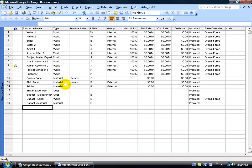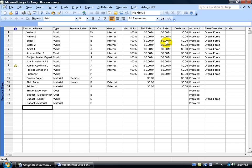Now keep in mind we haven't assigned any of our resources here a cost. Like for our writer, you've got your hourly rate, your overtime rate, or your one-time cost per use. So you could say instead of charging Editor 1 $10 an hour, he just says give me $1,000 and I'll get it all done. There's your one-time cost use.